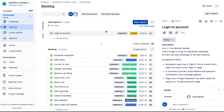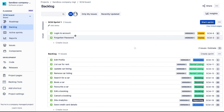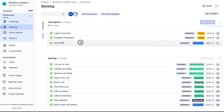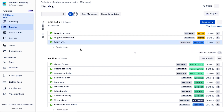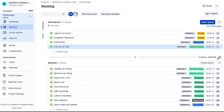After you've gone through those points for the product backlog item, keep going and move on to the next items. Bring them in and go through those same points — technical details, dependencies, risks — and keep going until we reach the team's velocity that we calculated before. You'll notice the number of points added to the sprint shown here. So I'm up to 11 points, then 16, and we keep going. There we go — we've hit 21.